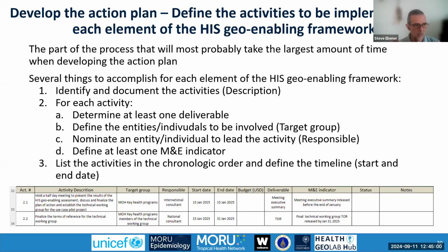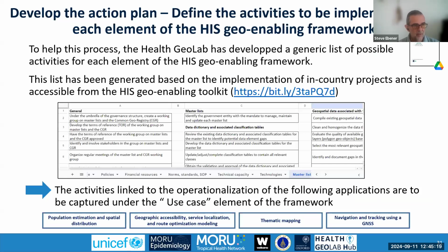And ideally you will list these activities in the chronological order in which you think they are meant to be implemented as part of the plan. And to help with this particular step, because that can be, again, quite time consuming, we have developed a kind of bank of activities, if you want, which is based on the implementation of the framework in other countries until now.